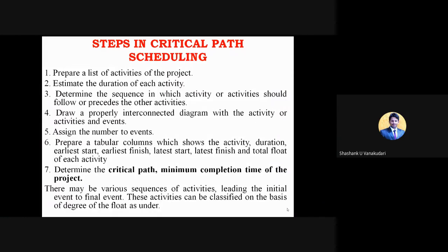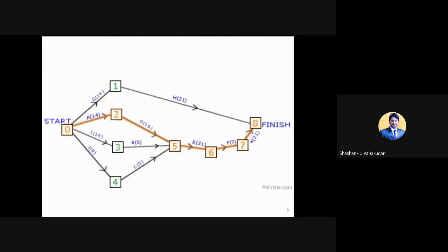And now after preparing the set of activities, we need to provide certain durations for those activities, right? So here we need to estimate the time durations for each activity, and then determine the sequence in which an activity or activities should follow or precede the other activities. So here, precede and succeed, those words are a bit new to you, but I will tell you what those preceding activities and succeeding activities are. Okay, so we'll be studying that in depth, but for today's purpose I will tell you one example.